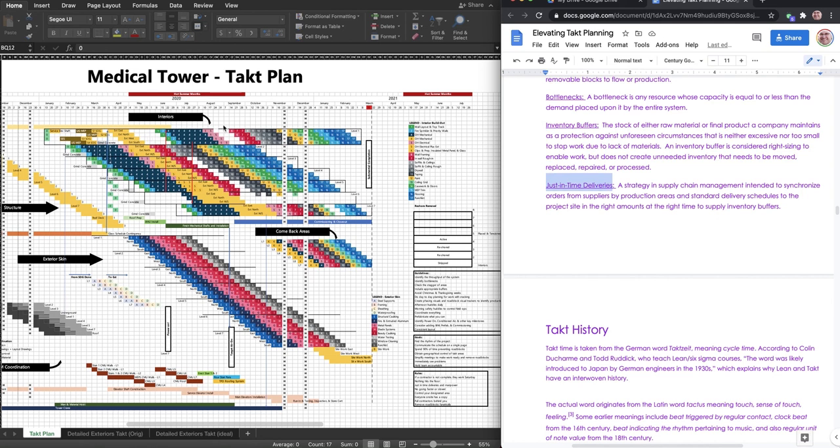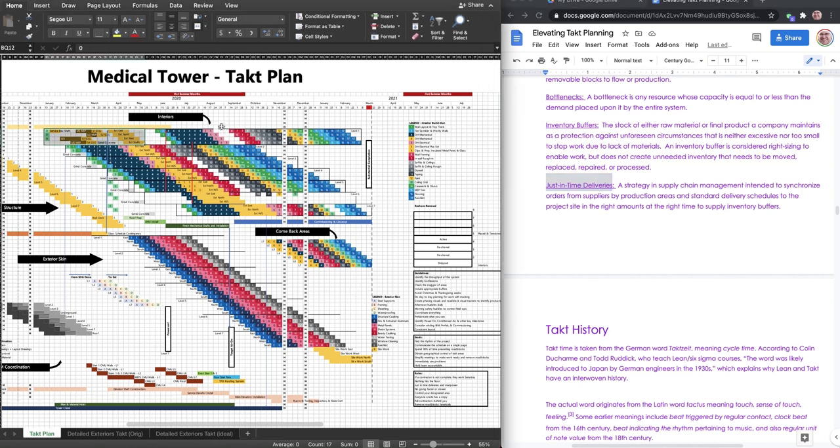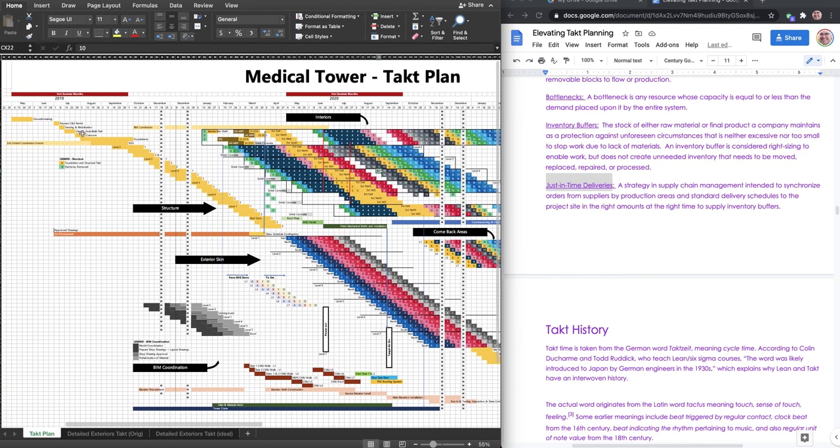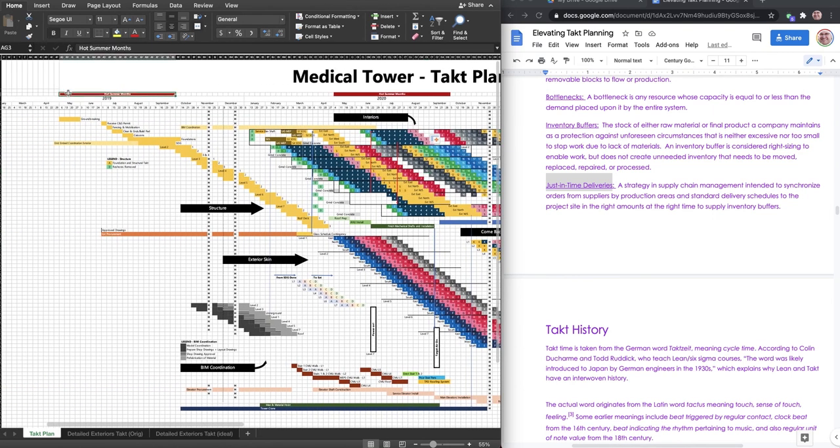And so when you're reading these Takt plans, just know from a basic standpoint, and I'm doing a couple little fixes to this as I go, it's super easy in Excel, that when I look at this Takt plan, I've summarized the hot months and cold areas. You want to do the cold winter months. This is the year, month, the Monday. It represents 5 days in the Takt time, but I just have the date of that Monday.